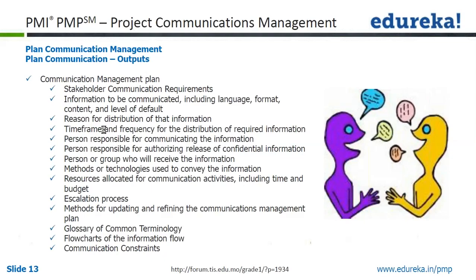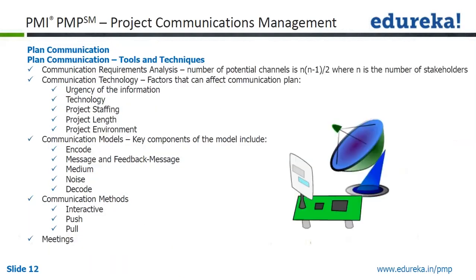Srinidhi has a question which I'll answer immediately, because I think it is just about push versus pull technology. The push example I gave is email. The difference between push and pull is that you are pushing the information, that is, you are sending email to the receivers. As a project manager, you have a status report, you send it using email, that is you are pushing the information. In case of pull, you publish the data on the website.